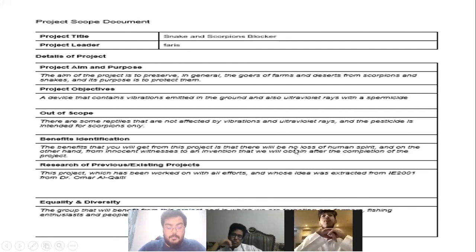The difference is that the project charter has the project description and goals, business case, high-level requirements, and constraints. The project scope statement has the project scope description, assumptions log, and description of deliverables.